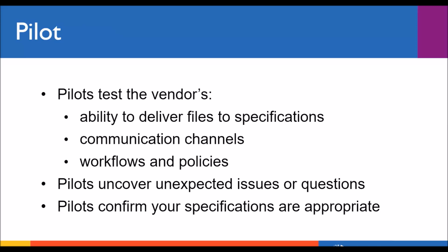Before you jump into the full project, if you've attended any of my webinars, this will be a familiar concept. You're going to want to do a pilot. Now, in some cases, you might even do it before you select a vendor. Depending on the size and complexity of the project, you can do a pilot with multiple vendors to compare results. Depending on the vendor and the amount of work being done, you may have to pay for a pilot, or the vendor might include a pilot at no charge. It really just depends. But even if you have to pay for the pilot, it's worth the cost to ensure the success of the full project.